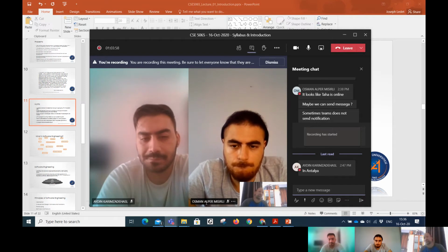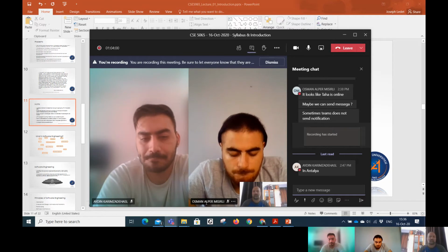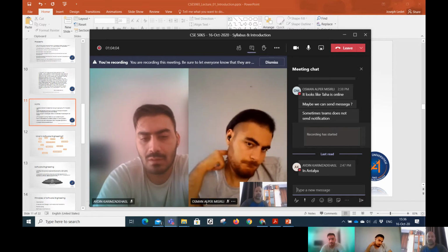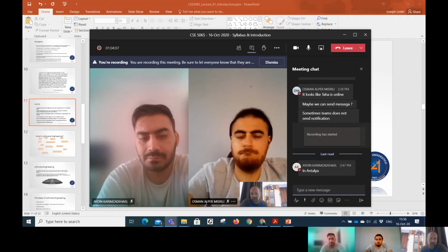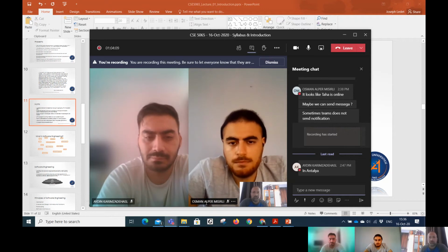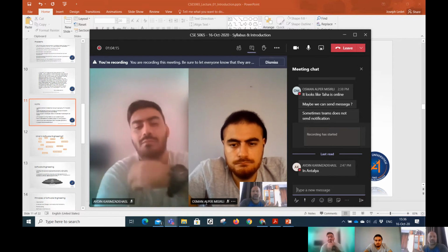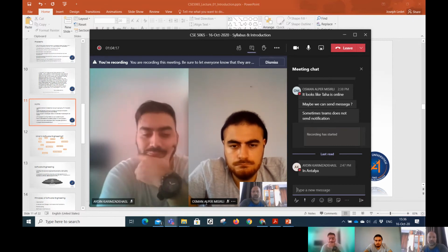Because in construction, I don't necessarily have to train you how to lay bricks if you're a bricklayer. I don't need to train you so much about how to plaster or paint walls if you're a plasterer or a painter, right? But with a programmer, there's time that we need to train you on how the system works, right? We need to train you on things.